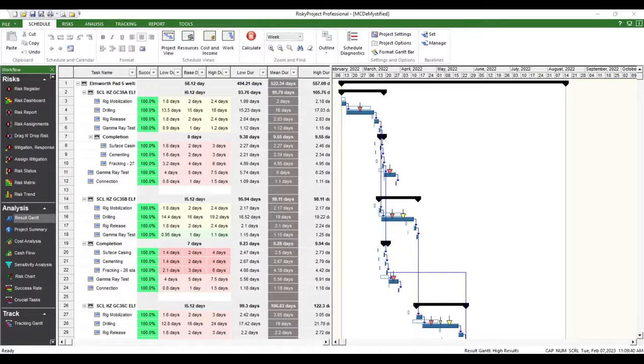Scott, we just have another question. If you have a task that has no uncertainty as to the remaining duration, like a meeting, it will start on a given date and finish on a given date. I wouldn't apply any uncertainty at all, because you know that you're going to a meeting and you'll be back.